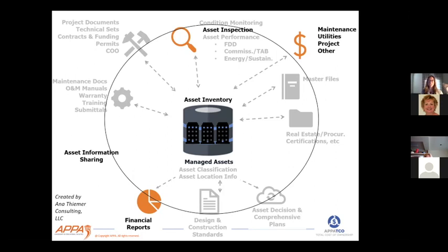If it's higher cost, it gets a higher score. What's the condition of it? We have 10 old buildings, 10 old HVAC systems. Which ones do we do first? Our external assessment helps us to figure that out. And then we populate that onto graphs and depict that for our organization.